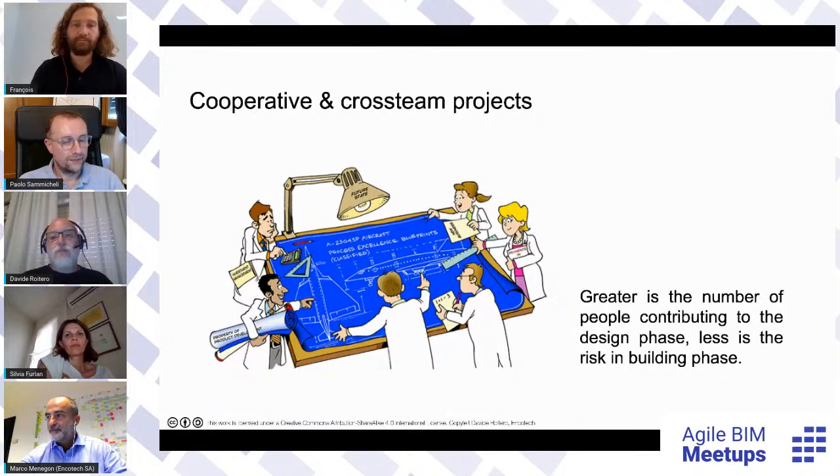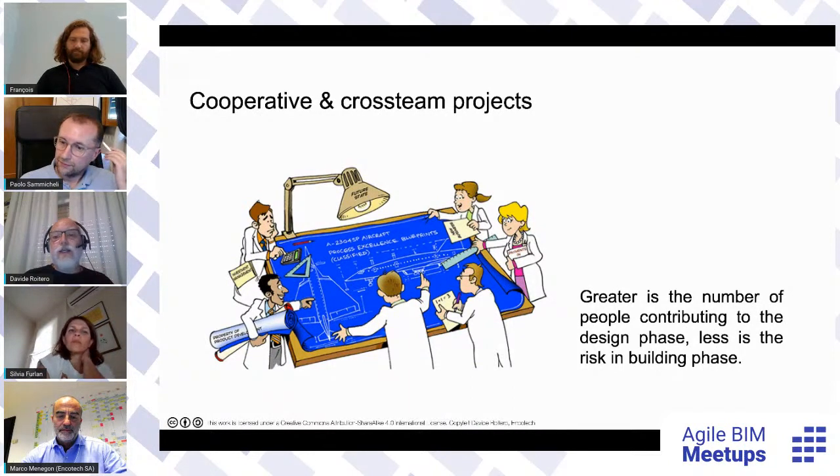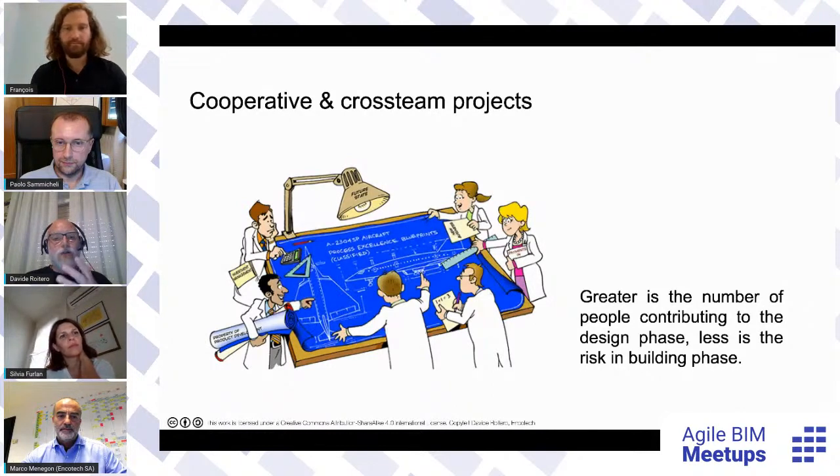In one of the last projects, for example, due to a very tight deadline given by the client, we experimented with swarming, the swarming pattern. A pool of architects started working on the same project to finish first, and this, in addition to shortening delivery times, has created a lot of motivation in the people of the teams. And the work that follows is taken by more people because many people know the project. Swarming was a really good technique to work on a project together and to raise the cross-functionality.